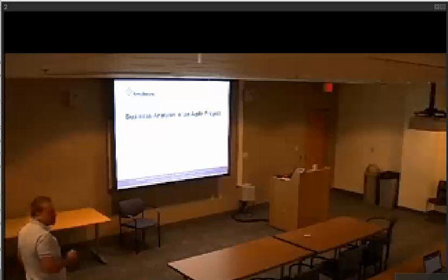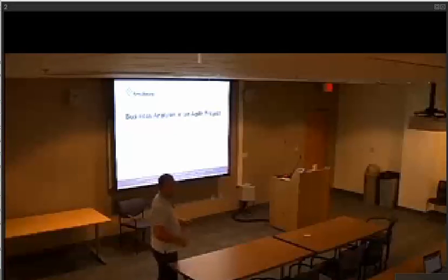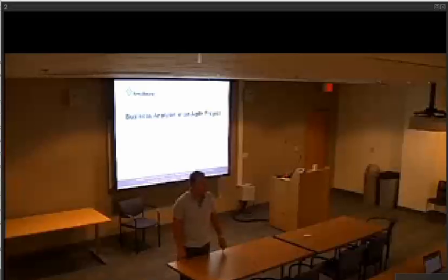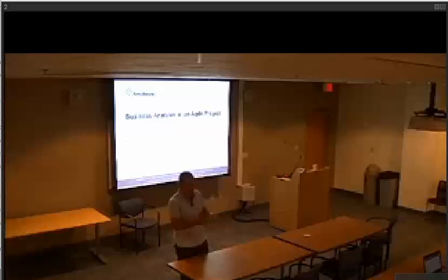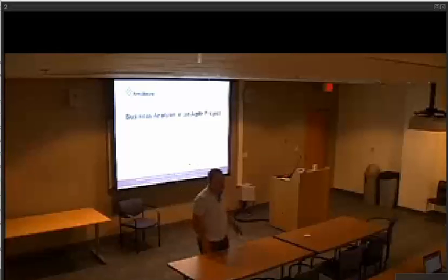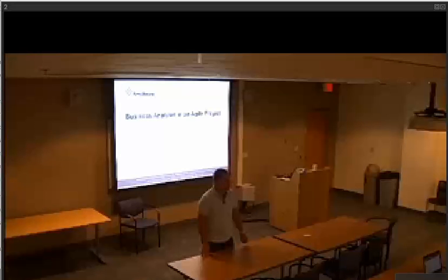It creates a tremendous amount of waste, incredible amounts of waste. Why? Task switching. Yeah, transition time, context switching time, whatever you want to call it, right? There's tremendous overhead in dropping one project or one task and then picking up another one. Now, obviously, we have to do this several times per day because we're trying to keep multiple clients happy. A recent study came out last year. What's the drop in productivity if you're task switching between 2 different tasks? Anybody happen to remember, read the article? It's a staggering 40%. It's about 40%.